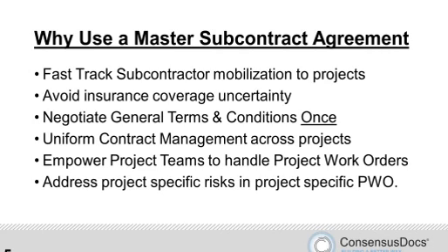And by doing that and doing it once, then we allow on a project basis that we can just focus on the work, the project work orders, which are project specific. The project executives and project managers can primarily negotiate and finalize with legal insight, if they need it, the details of how that individual project will be worked out.